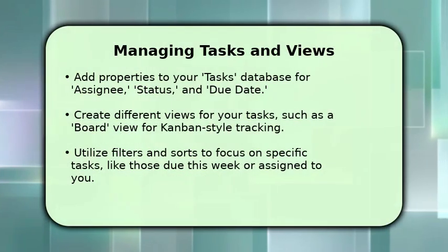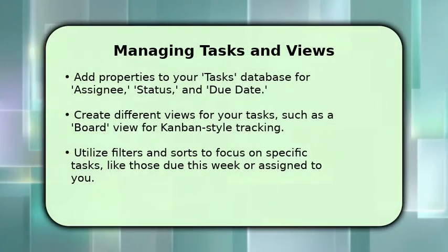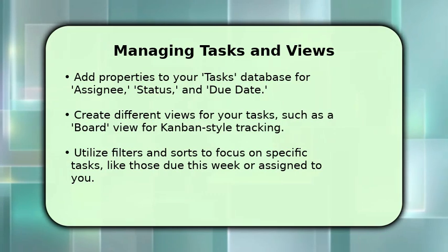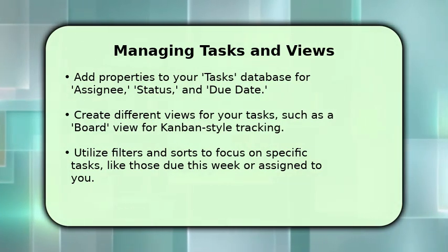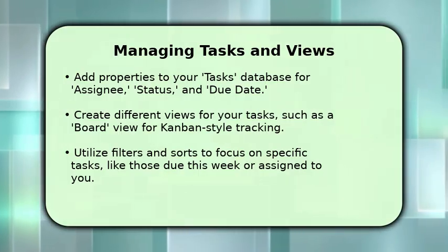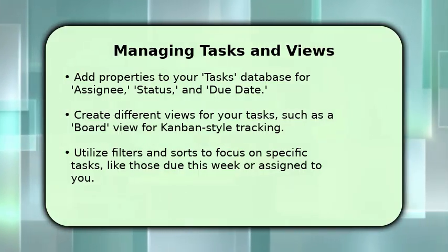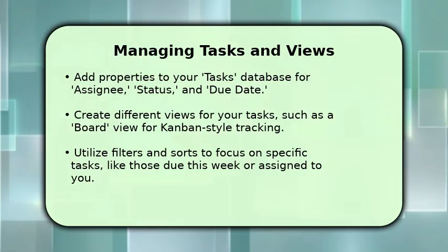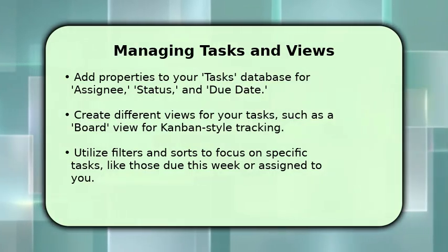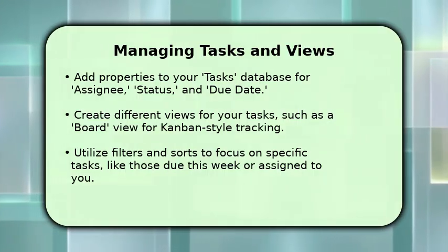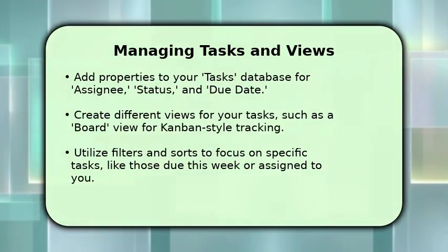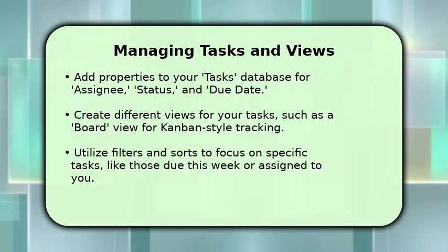To effectively manage your workload, add crucial properties to your tasks database, including assignee, status, and due date. Next, create various views for your tasks. A board view is excellent for a visual Kanban-style workflow, letting you drag and drop tasks through different stages. Finally, leverage filters and sorts to quickly focus on what matters most, whether it's tasks due this week or those